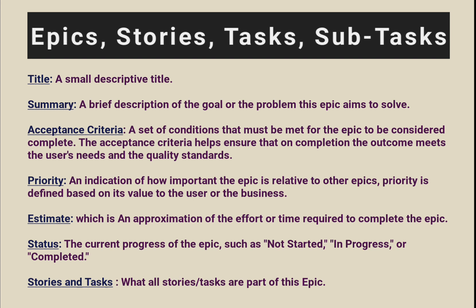Priority: an indication of how important the epic is relative to other epics. Priority is defined based on its value to the user or business. Estimate: an approximation of the effort or time required to complete the epic. Status: the current progress of the epic, such as not started, in progress, or completed.